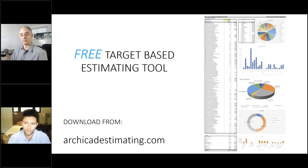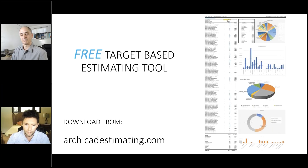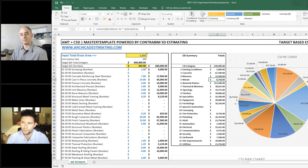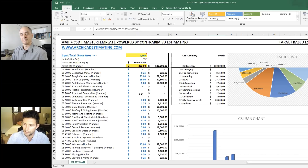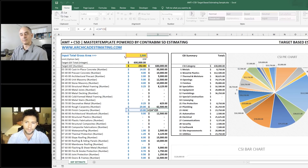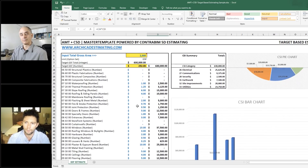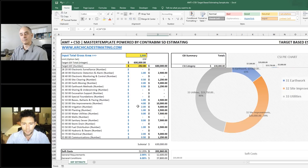Eric alluded to a free download. We have this target-based estimating tool. That's really something that we broke out of the bigger quantity and estimating reporting workflow. But this is available at archicadestimating.com. It's a really fun little tool to play around with. It's all based on gross area calculations. So you can plug in very quickly the overall size of your project and then go through the different line items and build up your own estimates. You can see everything adjust live. It's a good way of starting to think about estimating from the big global picture of gross area calculations and gross area costs.